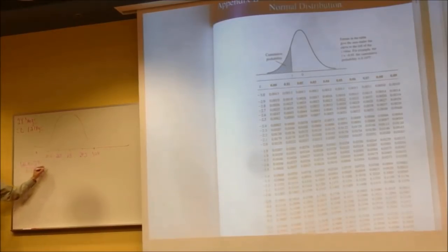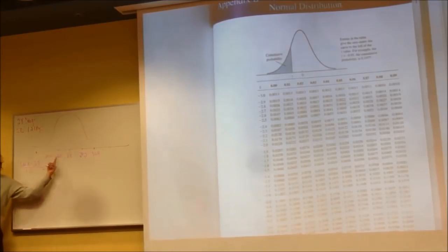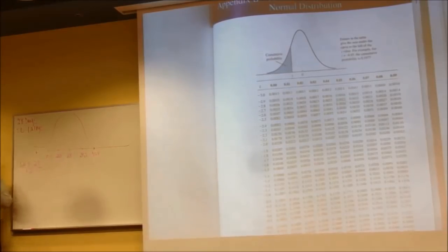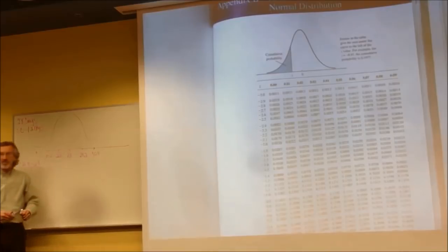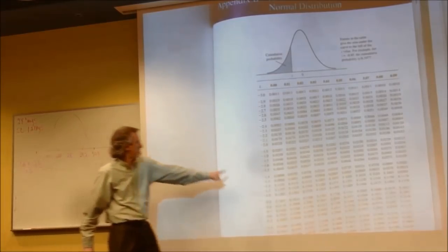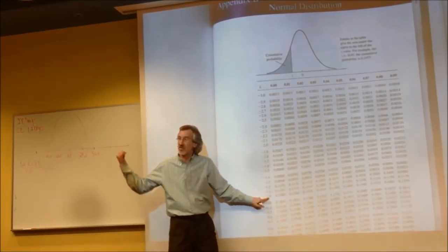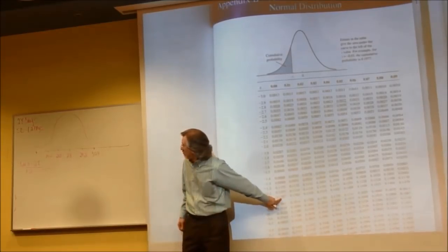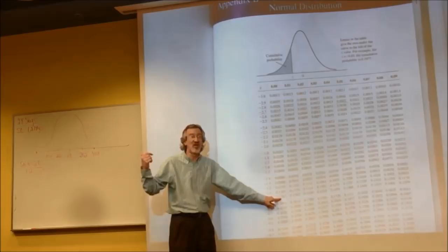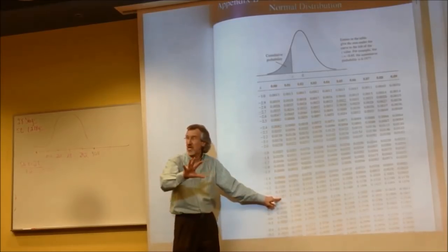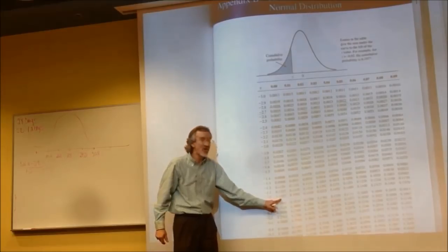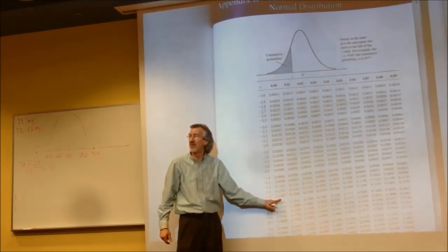You do the math, it's going to be -1, because I picked a number that happens to be exactly one standard deviation below. So I look up the -1 on my chart, 1.0, because it's 1 on the nose. The probability of the time being 26.8 days or less, when the expected time is 28 days with a 1.2 day standard deviation, is about a 15.87% chance.